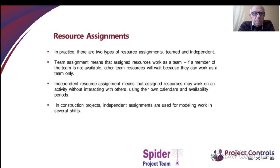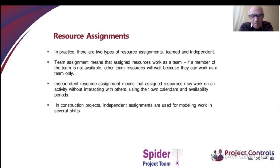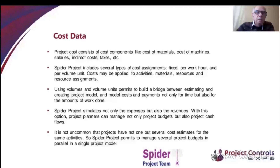There are two types of resource assignments: teamed and independent. A teamed assignment means all resources in the team work together — if one member is unavailable, the whole team waits, because they only work together. Independent assignment means each resource works by its own calendar and availability periods, so assigned resources may work at different times. Independent resource assignments are useful for simulating work in several shifts, and Spider Project can plan projects with work across multiple shifts.